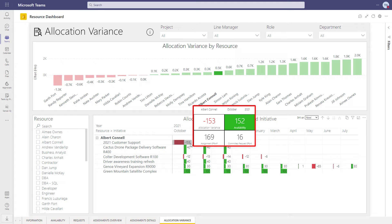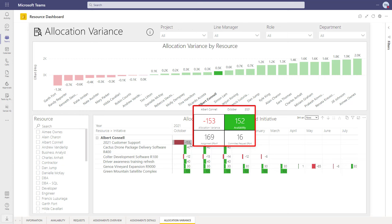He's approved to work on the project for 16 hours in October, but has 169 hours of assigned work, which is 153 more than we agreed to.